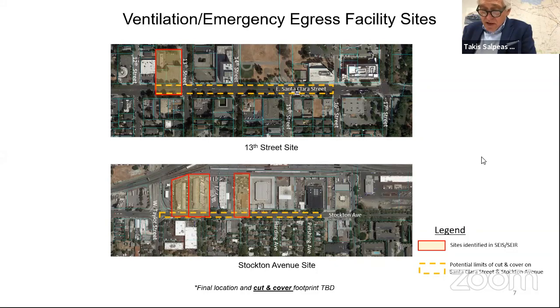I didn't work on that project, but I am very closely monitoring the Purple Line of LA Metro in the West LA area. As you probably heard, they are doing 22 feet twin bores, but they drag them through cut and cover boxes, similar to what we have here. They're going through the Wilshire, Century City, Westwood, UCLA, and the Beverly Hills.